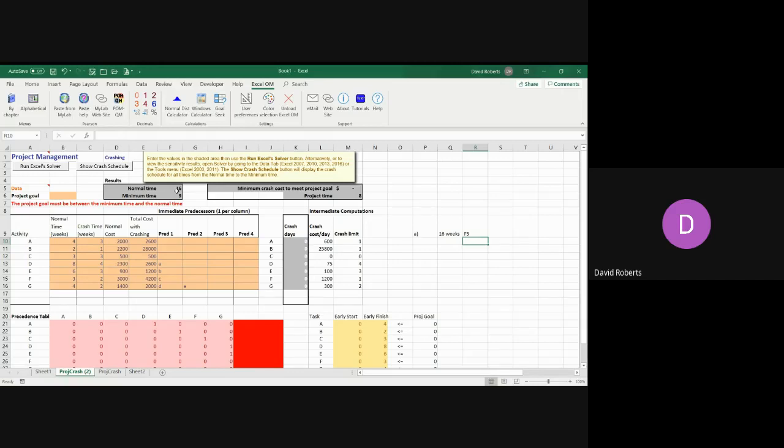What is the total cost required for completing the project at normal time? So once again, we have to use the Excel function to total up the column. So use the sum function and select the data. And so this is the answer for B, just total cost. $12,300 normal total cost. So it asks for the total cost for completing this project using normal times.